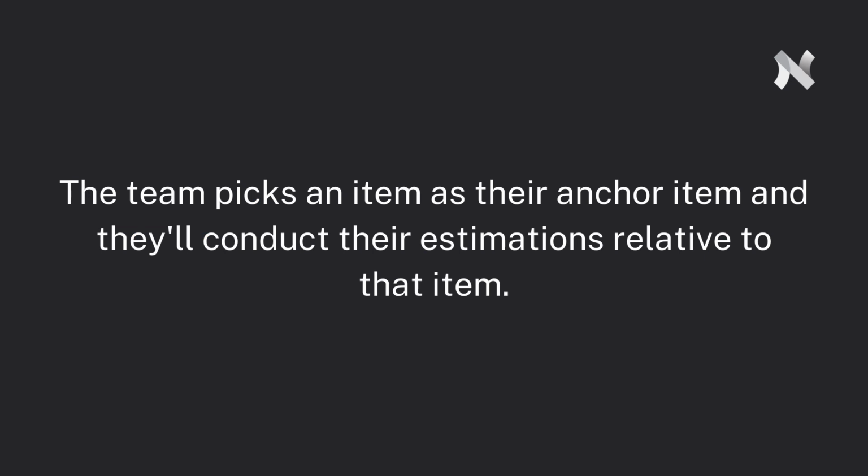Then there is story points. Story points are a bit more advanced than t-shirt sizes, but the concept is similar. The first step is the same. The team picks an item as their anchor item and they'll conduct their estimations relative to that item. Instead of using t-shirt sizes, this process uses what are called story points.